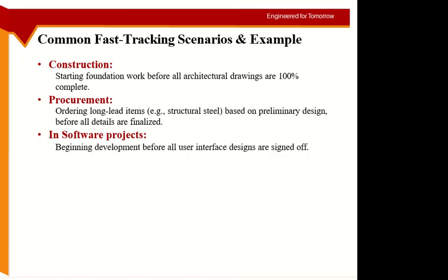So in order to overlap this waiting period with the other work, you may order these items beforehand. Even during the preliminary design phase, if you have an idea. The final design is not ready, but you know that I need approximately this much steel, or some other item.